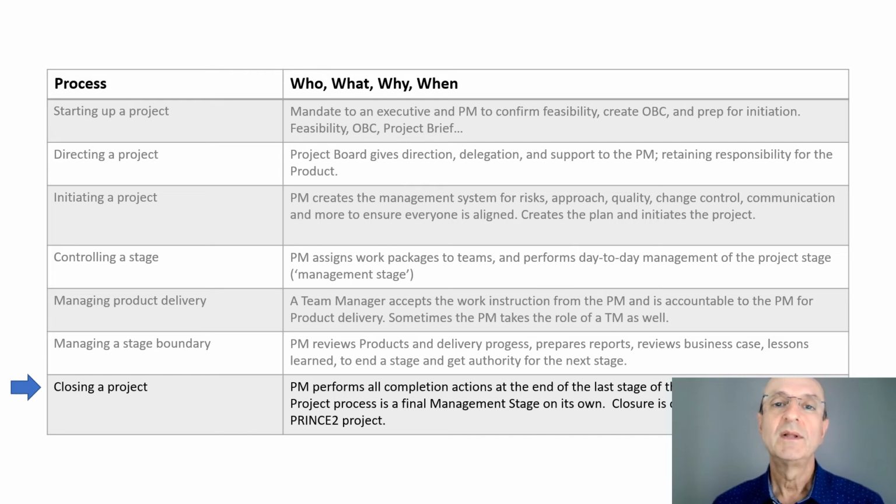Where you will consolidate all of the finances, you will release the resources, you will ensure that all of the documentation is filed appropriately, and you will make sure that all of the appropriate documentation is destroyed. And you would be settling the accounts with the various suppliers with whom you've worked as well.